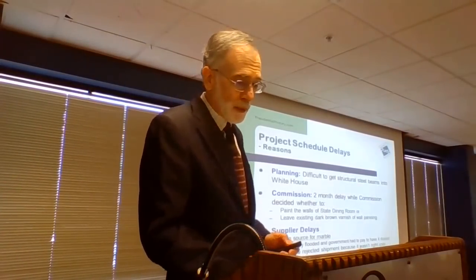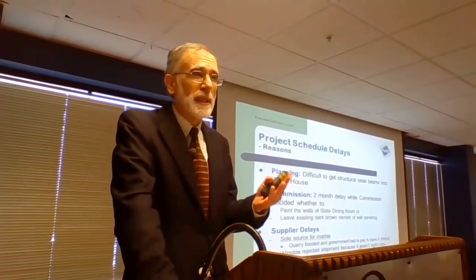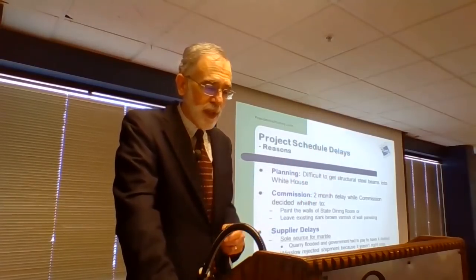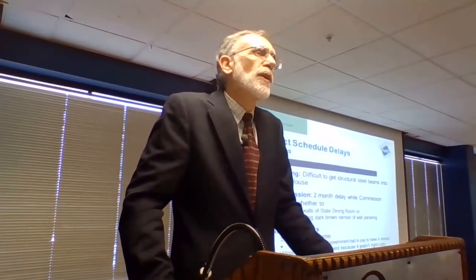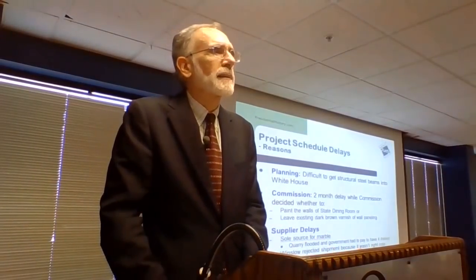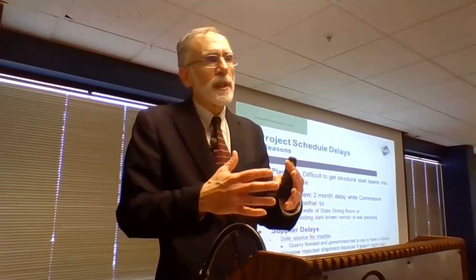So other reasons why there were schedule delays: they had trouble getting these structural beams into the White House, because you've got to keep the walls there. The commission that was appointed to manage the project spent 2 months making a decision. What should we do with the walls of the East Room? Should we paint them, or should we leave the dark brown varnish on the wall paneling? That delays the project.